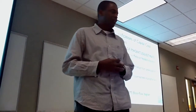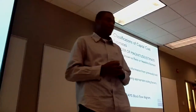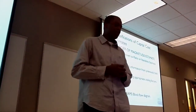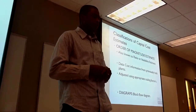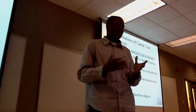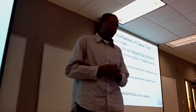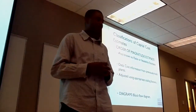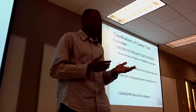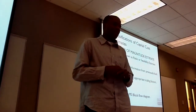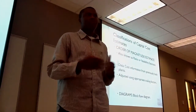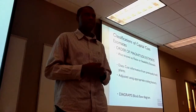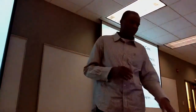In the classifications of the capital cost estimate, the first is the order of magnitude estimate. This is also known as a ratio or feasibility estimate. The data needed is cost information from previous projects, from previously built plants, and these data are adjusted to suit present-day reality. The diagram required is a block flow diagram.